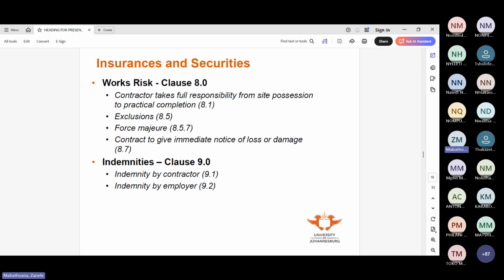It can't be that they keep changing their minds, but you are somehow expected to be paid the same. So for instance, if you're going to use Mampara bricks, your standard stock bricks, and then all of a sudden I'm like, you know what, I want facing brick here. You have those people with their internal walls, they want exposed brick. So they will say, I want the red FBX facing brick, no longer Mampara brick. The rate is going to change. That's a variation, and it needs to be dealt with as a variation.